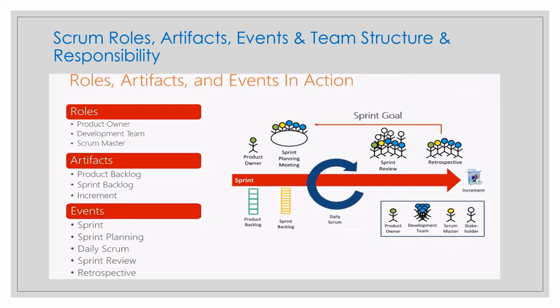So developers can select whatever structure and technique they want, as long as their daily Scrum focuses on the progress toward the sprint goal, and produces an actionable plan for the next day of work. So this is actually inspection of their progress toward the sprint goal, and accordingly they can use their own techniques. This creates focus and improves self-management. So daily Scrum improves communication, identifies impediments, promotes quick decision making, and consequently eliminates the need for other meetings.